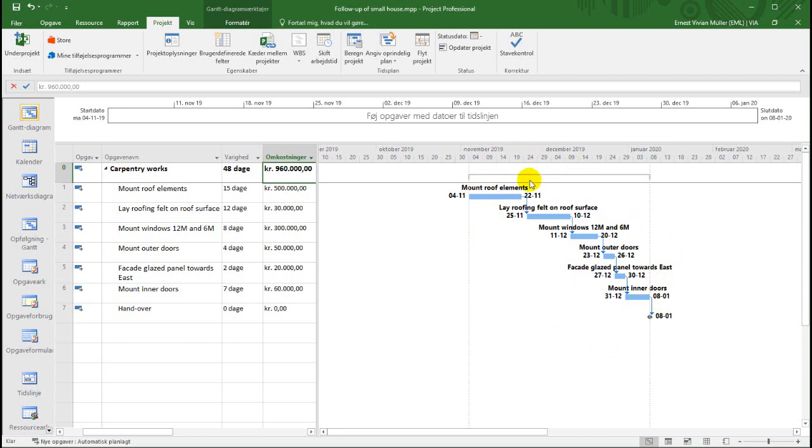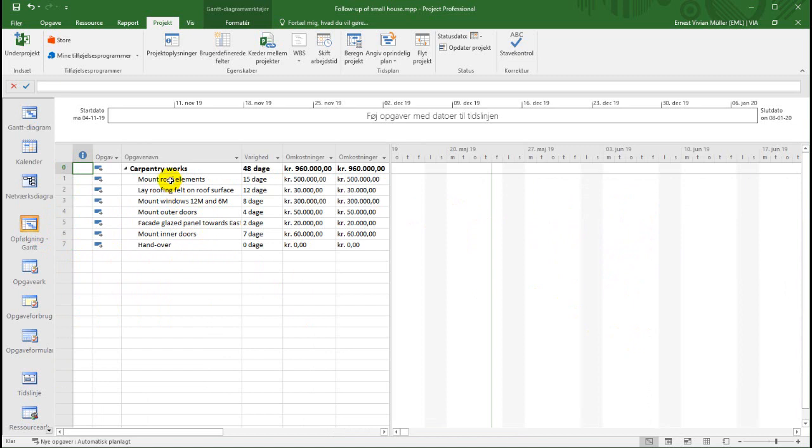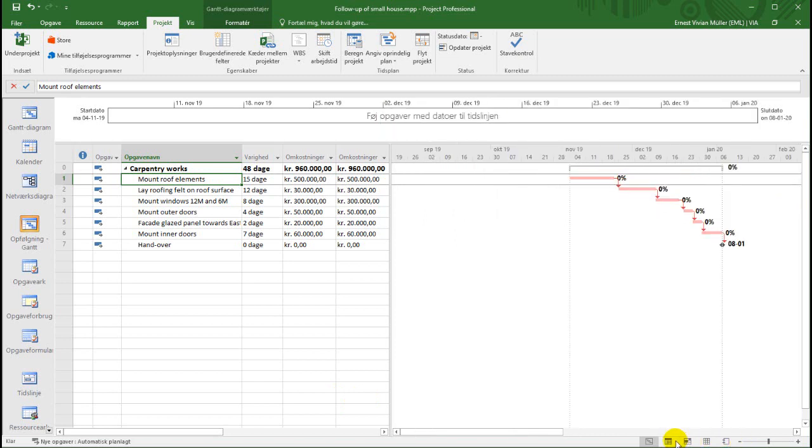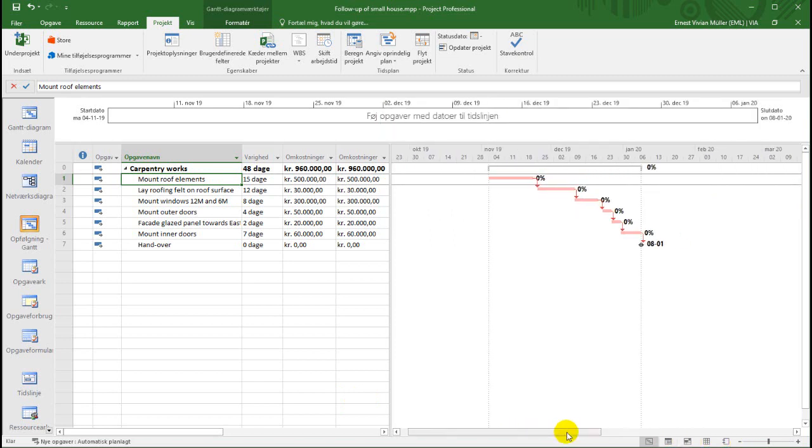When the contract is on site, this plan has to be followed up, and the best way to follow it up is to use the tracking Gantt. If I click to the tracking Gantt and use Control Shift and F5, I have the go to here, and you can see my activities here. The difference between the tracking Gantt and the Gantt is that the bars are much slimmer, and they have 0% complete in this case next on the right hand side. I can format this with the text and so on and so forth.